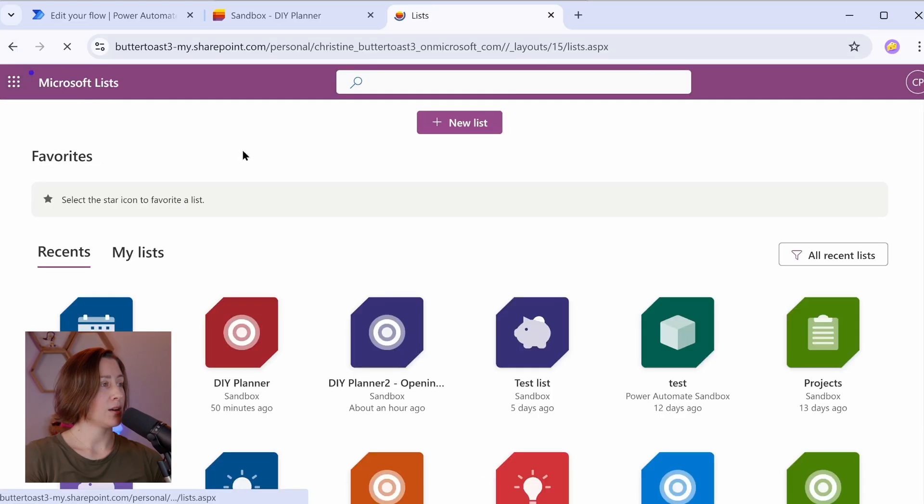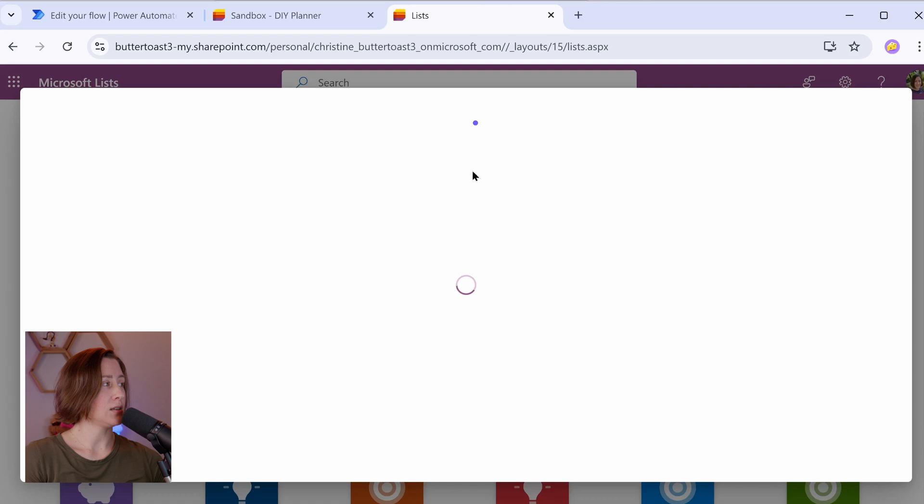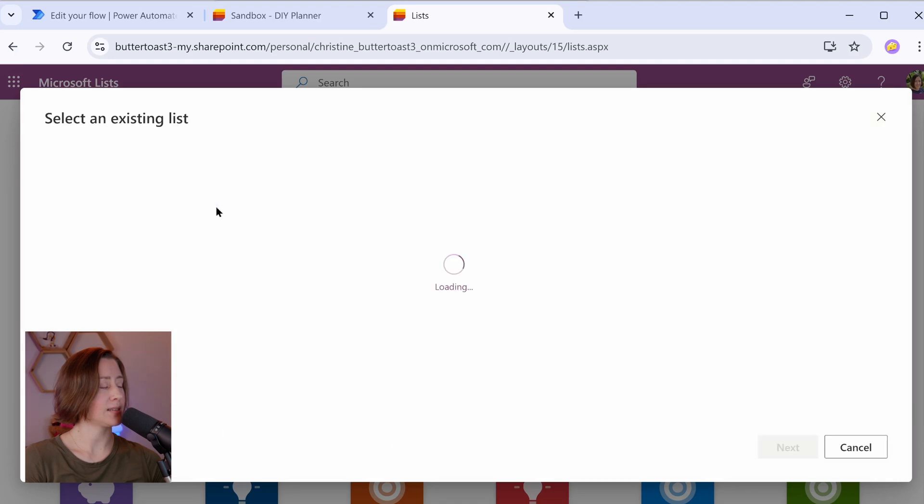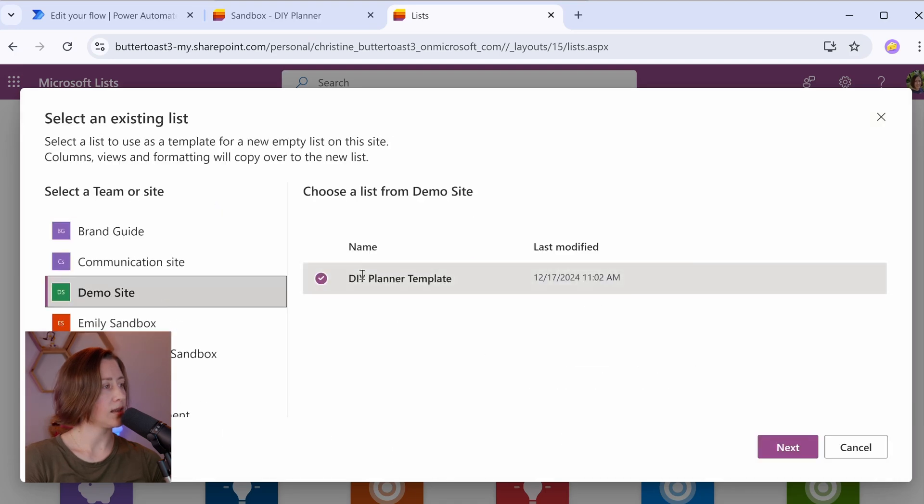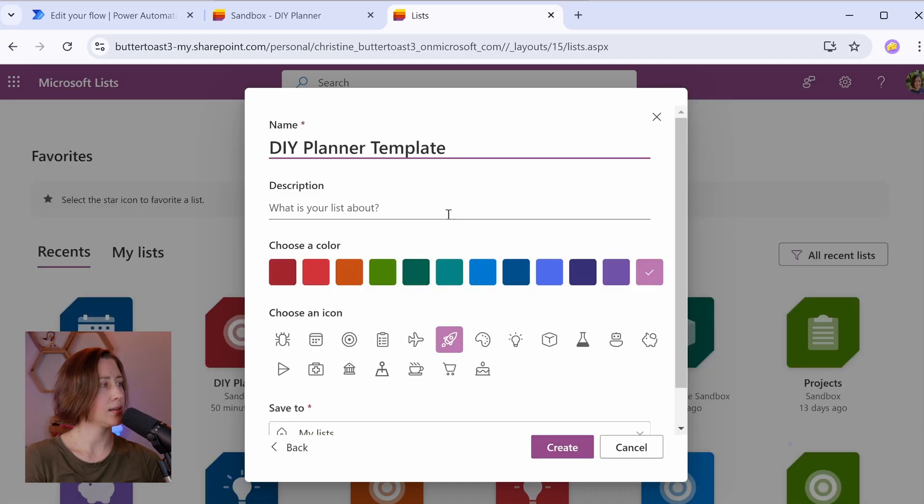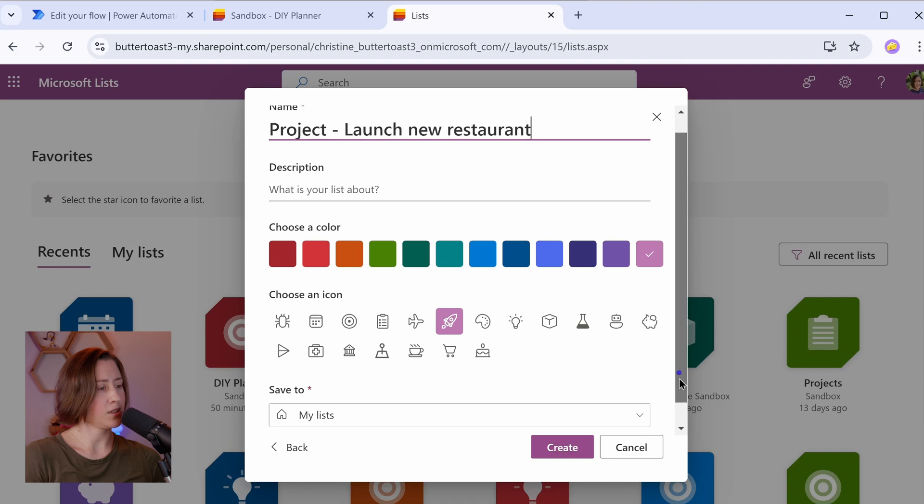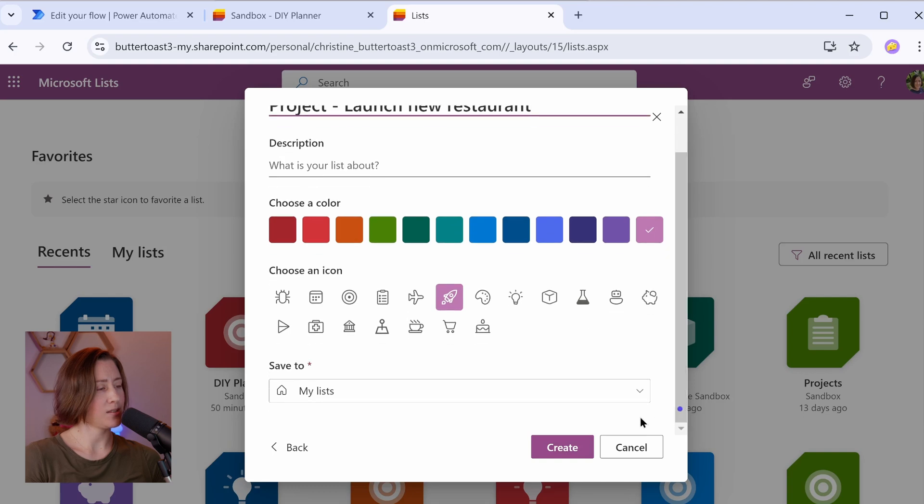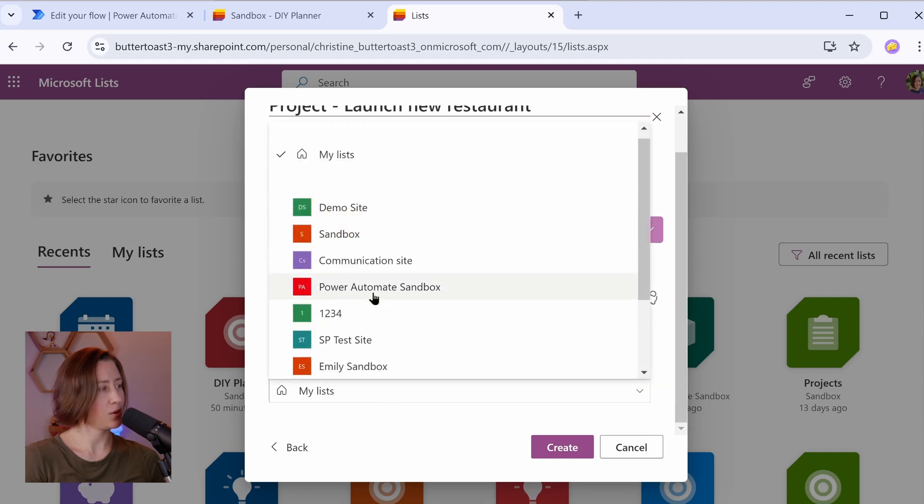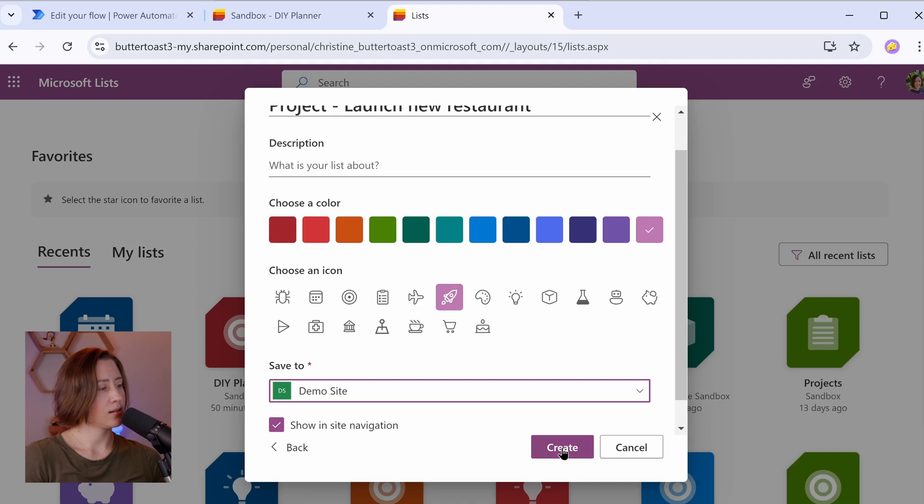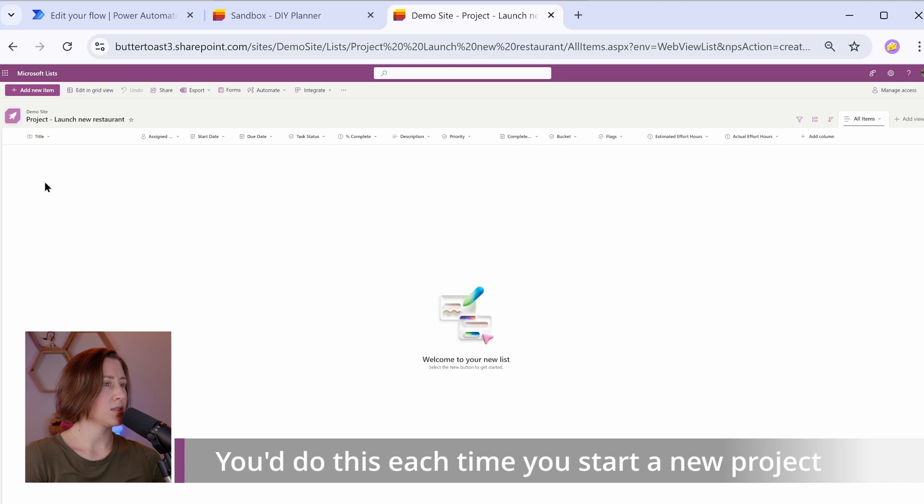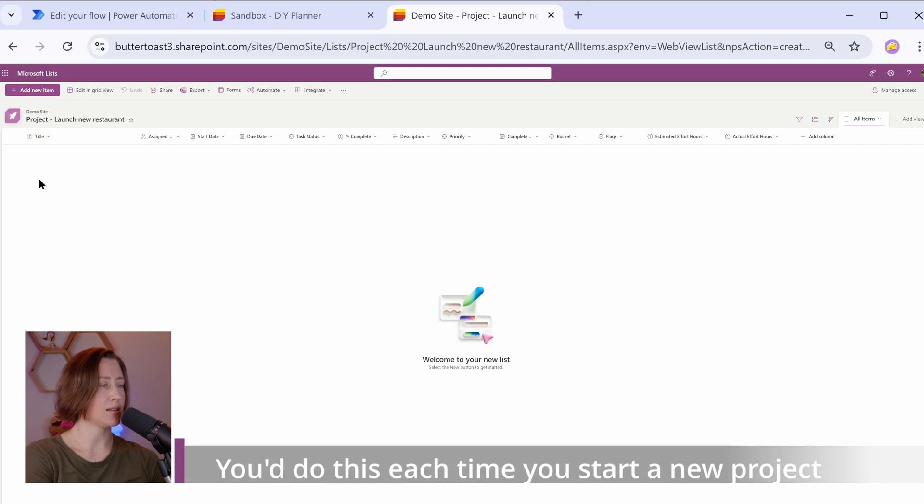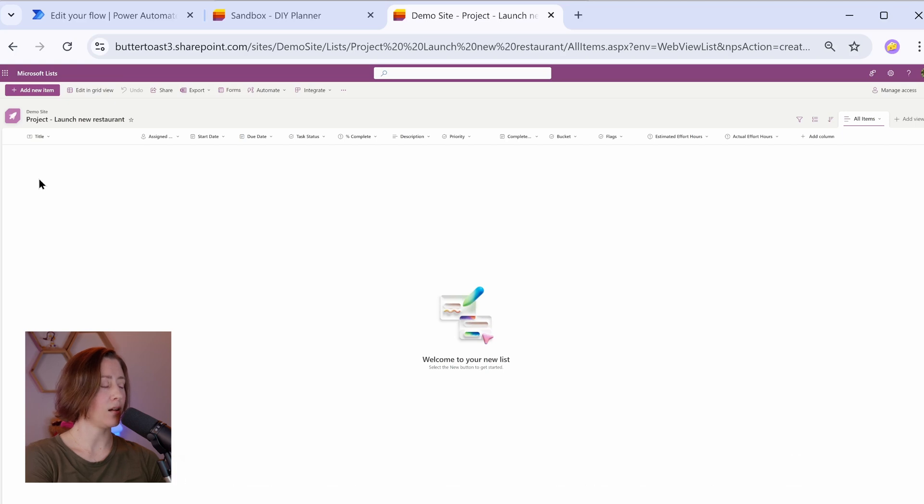I'm going to go back to Microsoft lists and I'm going to create a new list and choose the list that we just created as the list to create from. So we're going to choose from existing list and then choose the site that the template is in. Select the template, click next, and then choose where you want to put it. This part is easy to miss. Don't put it in my list, put it in a real site and then click create. And it's now created that list for us. So having exactly the same columns on these lists every time is really going to help if you try to combine the data later in Power BI because it's going to want the column names to be the same.